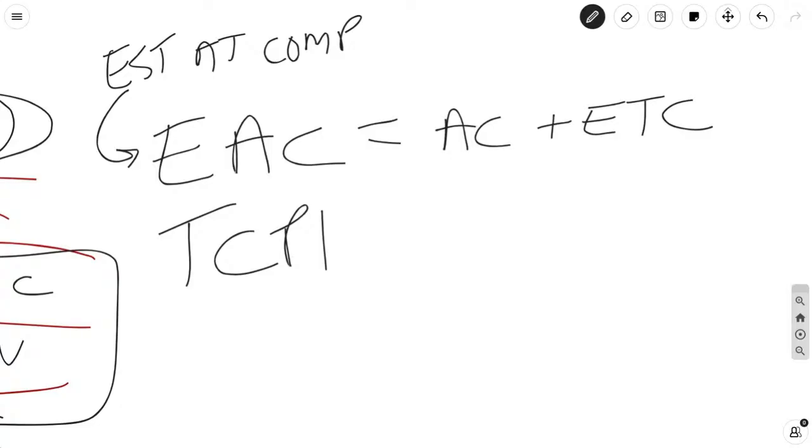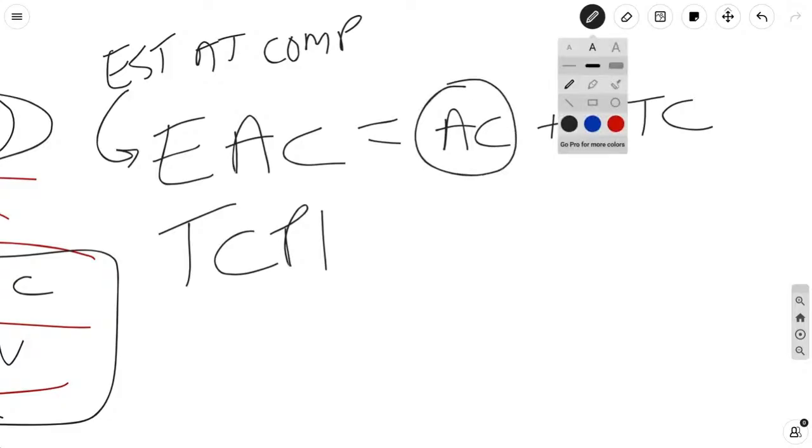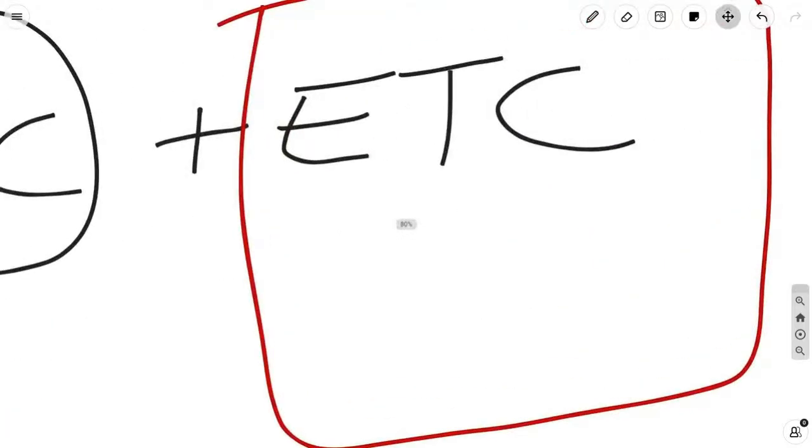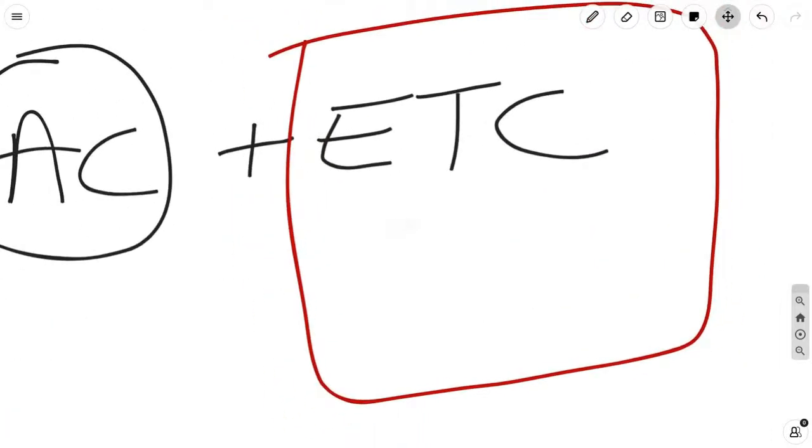And the way you get that is you look at the actual cost, which you already know about, the actual cost to date, and then the other metric, estimate to completion. You could look at this as a brand new bottom-up estimate. Like if your project is so far off and you cannot use any of the estimates you had before, you can use a brand new bottom-up ETC.